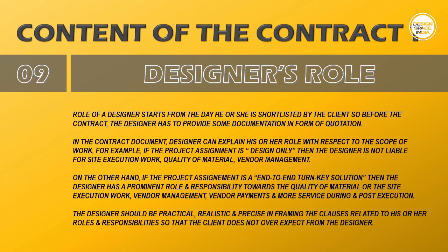On the other hand, if the project assignment is an end-to-end turnkey contract, then involvement of the designer extends further as a project manager who incorporates all site-related tasks like quality of materials, quality of site execution, vendor management and related procedure during and post-execution. The approach of the designer should be practical, realistic and precise in framing the clauses related to his or her roles and responsibilities so that the client does not over-expect from the designer.